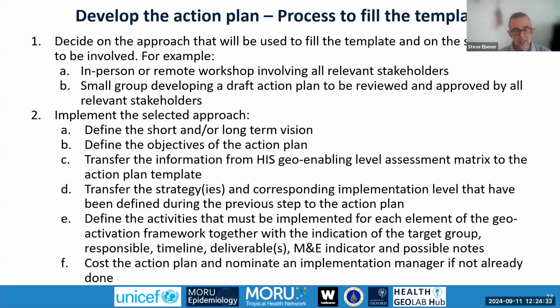So this is also a possibility, and I'm sure in between you have other potential ways to implement the different approach to reach the final action plan. In any case, what is good to generally do is to follow the steps that are mentioned here once the approach has been defined, which is first to start by really having an agreement on the short and or long-term vision: what is it that you want to achieve and by when, because that's what will really drive the content of the plan.